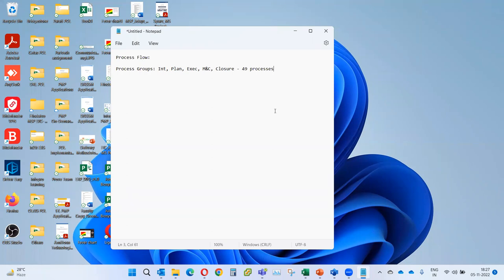When a project is conceived, the first document you create justifies the outcomes, keeps the project description, identifies the high-level scope, identifies the sponsor and project manager — that is the project charter. That is actually the first process we follow in project management, and it happens as part of initiation. From the project charter until closure, that is the flow, and we'll do a small exercise from initiation through planning.